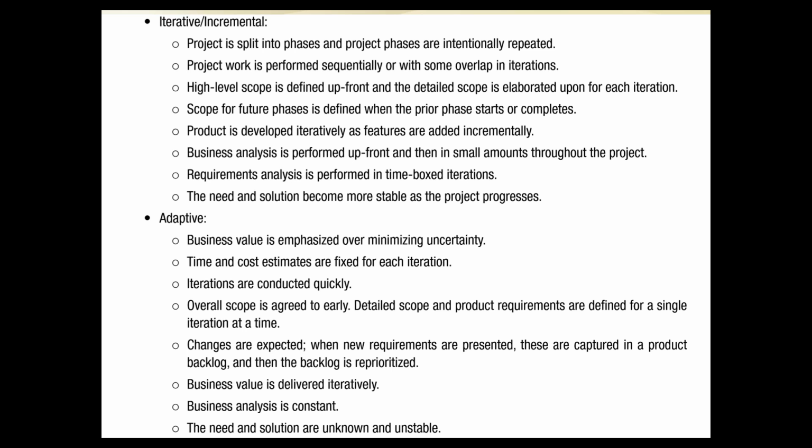All right. So if we start working for the 15 days of work, there is no change in it. Then the next 15 days there is a change which is going to impact the first phase of mine. No, it cannot. So how are we going to accommodate? The first phase cannot ever be impacted again, because the first phase we will get approved from the customer. The phase which is completed is a deliverable. So whatever has been built up is going to be delivered to the customer, signed off, received, and then we are working on the next phase.